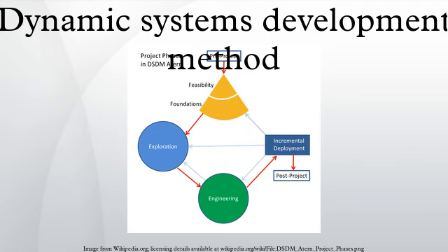And what are the most important risks involved? The most important techniques used in this phase are workshops. The deliverables for this stage are the feasibility report and the feasibility prototype that address the feasibility of the project at hand. It is extended with a global outline plan for the rest of the project and a risk log that identifies the most important risks for the project.